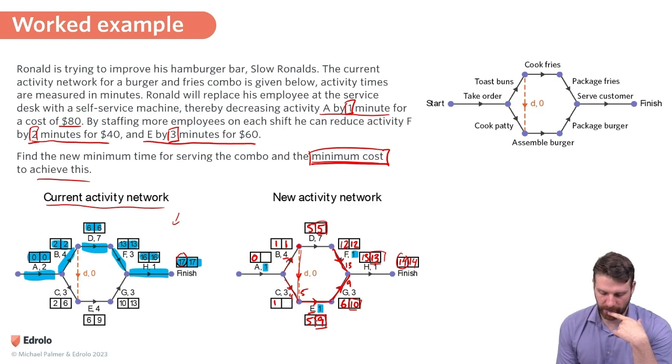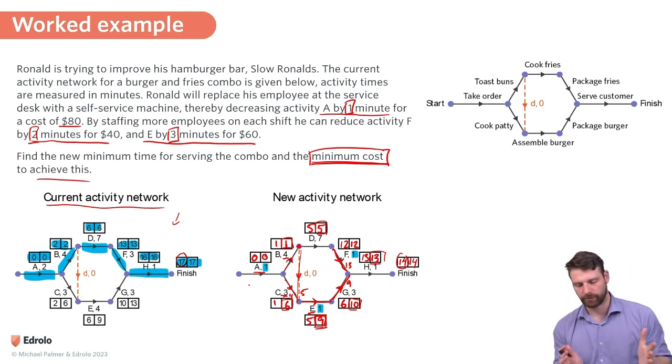Okay, here as well, I've got to finish C. So 9 minus 3 is going to be, I could start this at the 6th minute. And then again, I've got 2 choices for the latest start time of A. I could choose 6 or 1. Again, I want to take the lowest. So B needs A to start at the 0th minute to run this most efficiently.